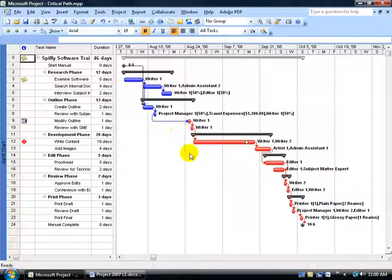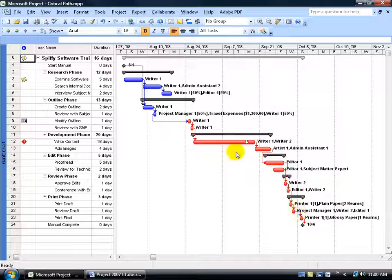And there it is. Anything in red — if I delay any of those tasks by one day, it's a domino effect. It will automatically push the next task over another day, all the way down to the project end date. The project end date will be pushed out from its due date of October 6th. Everything linked to that is in the critical path.